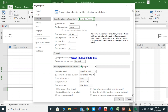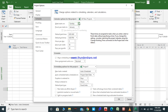Now let's set our working days and working hours. The working hours will be set as 9 hours per day. Saturday and Sunday will be our holidays. Let's assume that our project is in the United States and the first day of the week should be Sunday. We click on 'Week Starts On' and select Sunday. We will see how to make Saturday a working day in a following lecture.